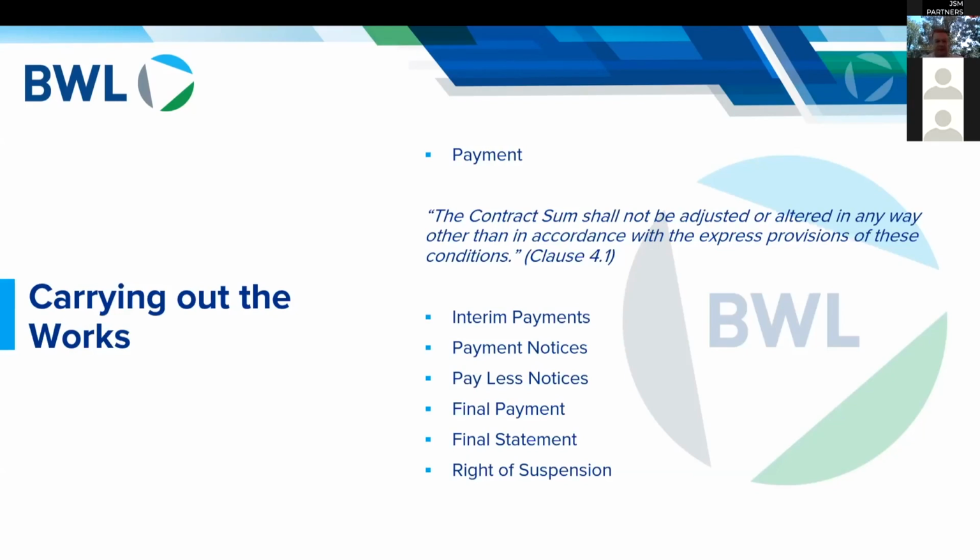So from a developer's perspective, this is great, because the developer's got their building built. There may be some defects remedies taking place, but largely everything's there. Potentially it's also able to be occupied. But in terms of cash, if the contractor has left a chunk of money to that final account process, in terms of cash flow, it can both massively impede the contractor but hugely aid the developer, because they will not necessarily need to pay the final account monies for a period of up to 12 months later.